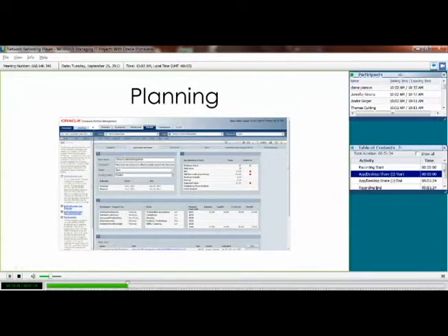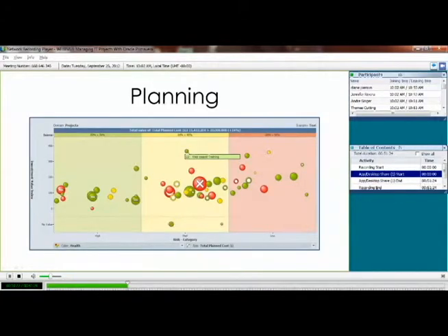So from here, this information then gets pushed into a graph like here, which is an investment chart. And this investment chart allows you to display three levels of information: an x-axis, a y-axis, and then the size of the bubbles, each bubble representing a certain project. A lot of the time, the size of the bubbles might be the budget or so on.